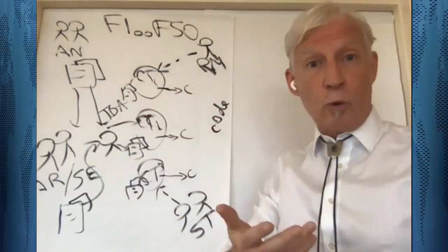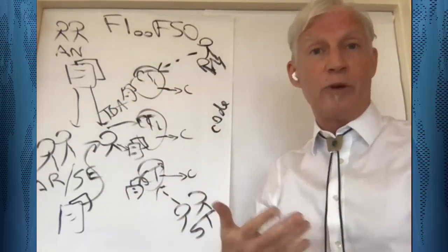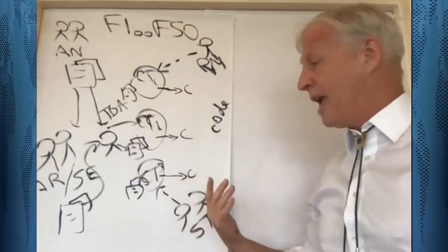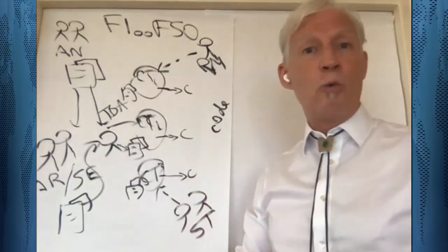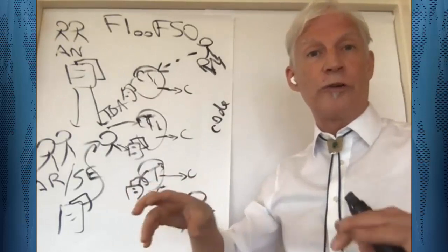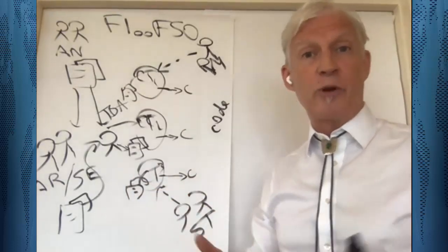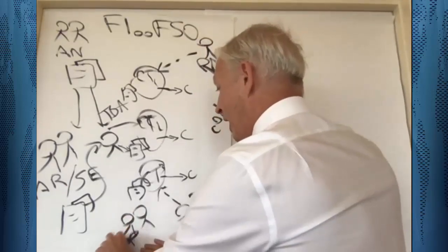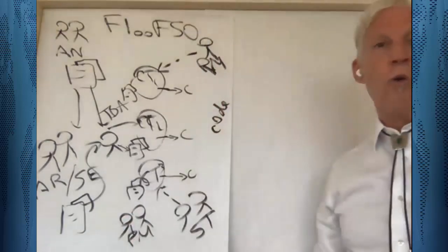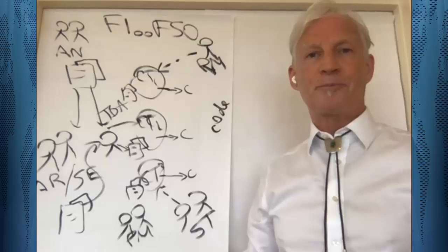So now we have a coordination problem and a tracking problem related to this complexity. And so we need another role introduced in order to try to coordinate between all of these partial workers in different silos and to track progress. So let's introduce the role of what's usually called project manager or some variation of that.